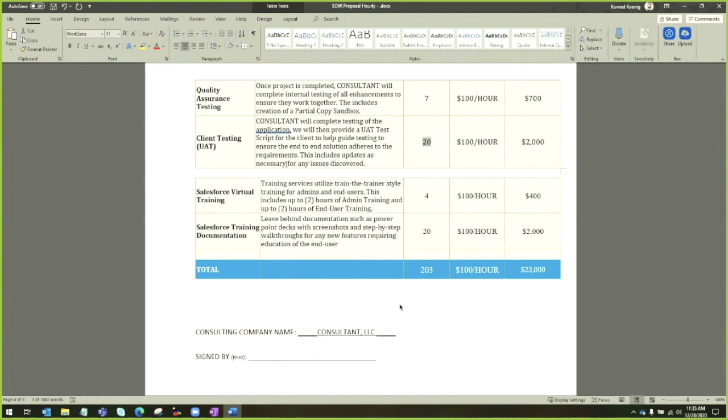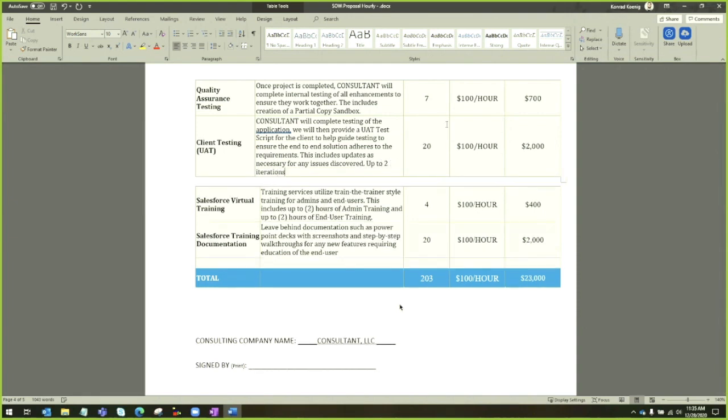And then I would put in the description, this includes up to 2 iterations of issue reporting and fixes, if that makes sense. You can word that. Yeah, I think you had some language in here before. This was probably what you were saying here, right? Includes updates as necessary for any issues discovered.